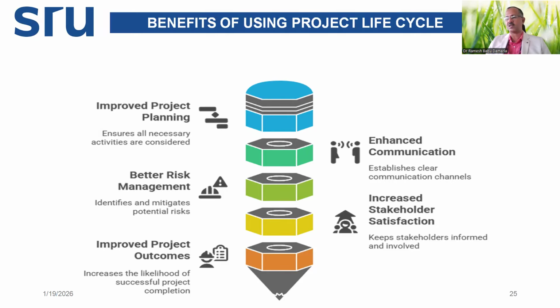Or a software project has issues with viruses. Maybe the risk mitigation strategy should be having authenticated, robust antivirus available. Or if leased servers are not up to expectations, then buy a server system per quarter. Such kinds of risk management strategies. Suppose it is a hardware project, and it is anticipated that suppliers are delaying the raw material supply. Then in the risk plan, we will have alternative suppliers B, C, D in the panel so that we can buy from another supplier immediately.